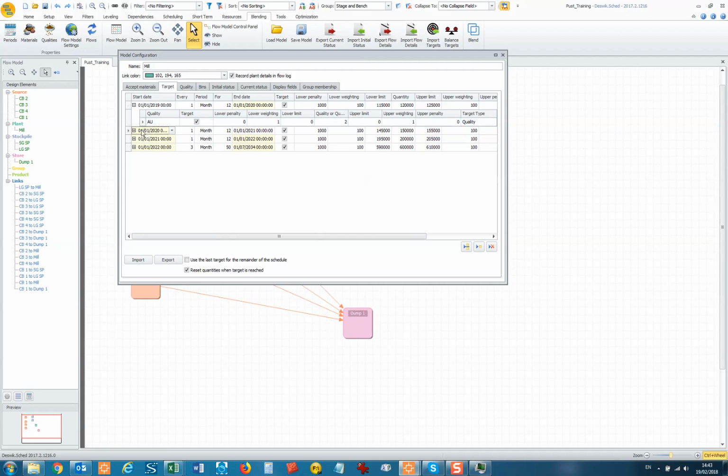How does it target? So if it has high grade stuff available, it will preferentially go for high grade. It'll stockpile lower grade stuff, or it won't mine. It'll target an area which will have higher grade within the mining parameters. So on each bench, it will look at what's highest grade there, and then it will feed material, or it'll put stuff onto the stockpile.